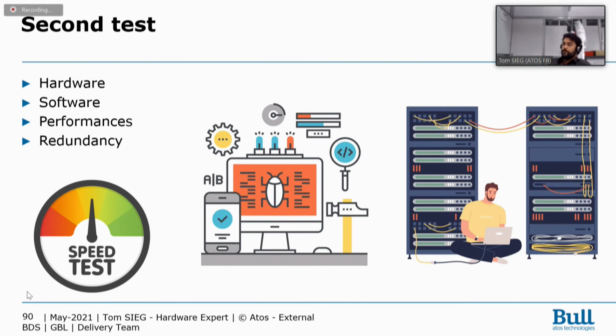just to remember, in a cluster you will have a lot of compute nodes. A little cluster is 200 compute nodes. A big cluster could be 2000 or 3000 compute nodes. So of course you will have some broken components. The factory, the different providers can't totally test and burn each component. You will always have almost 1 or 2 KO on site.